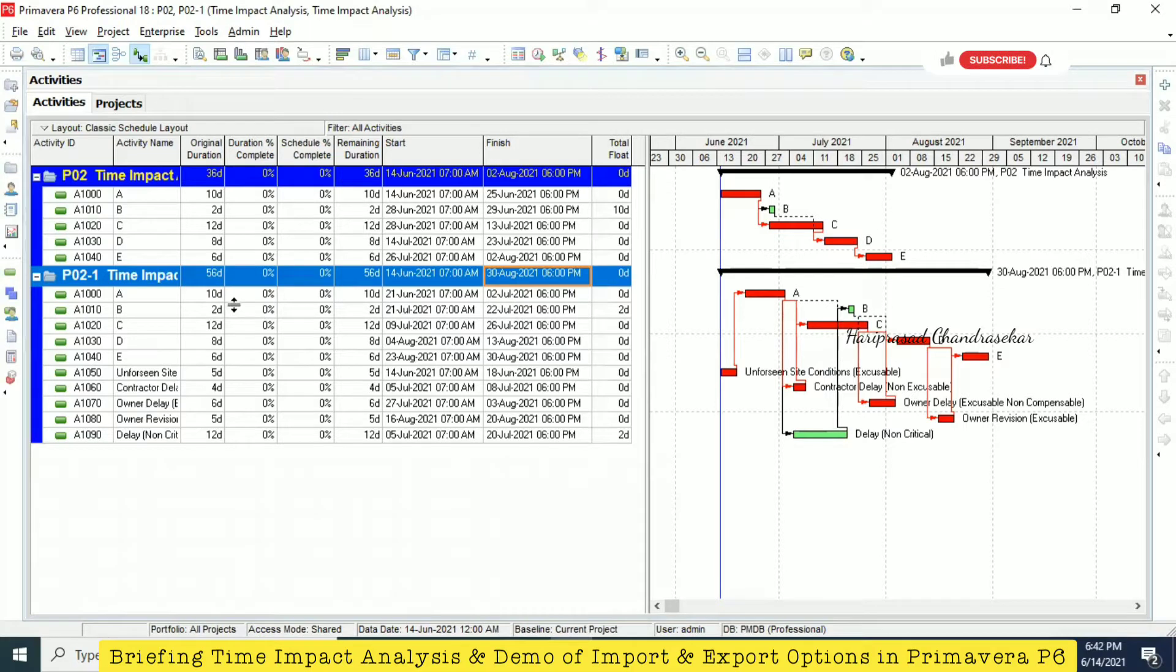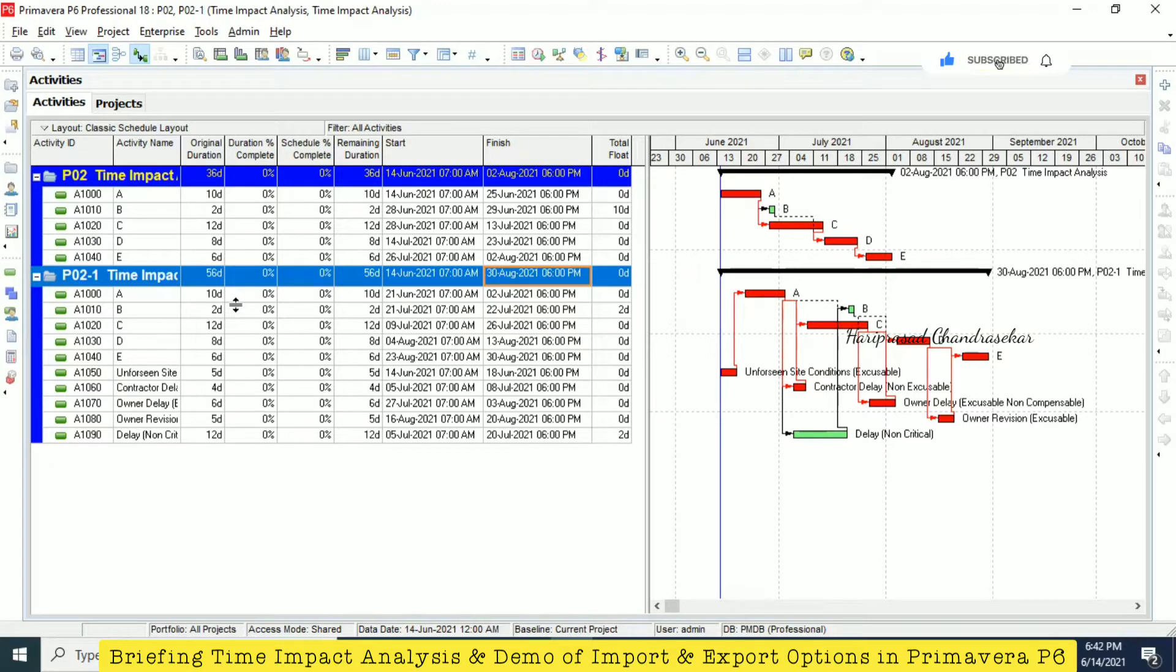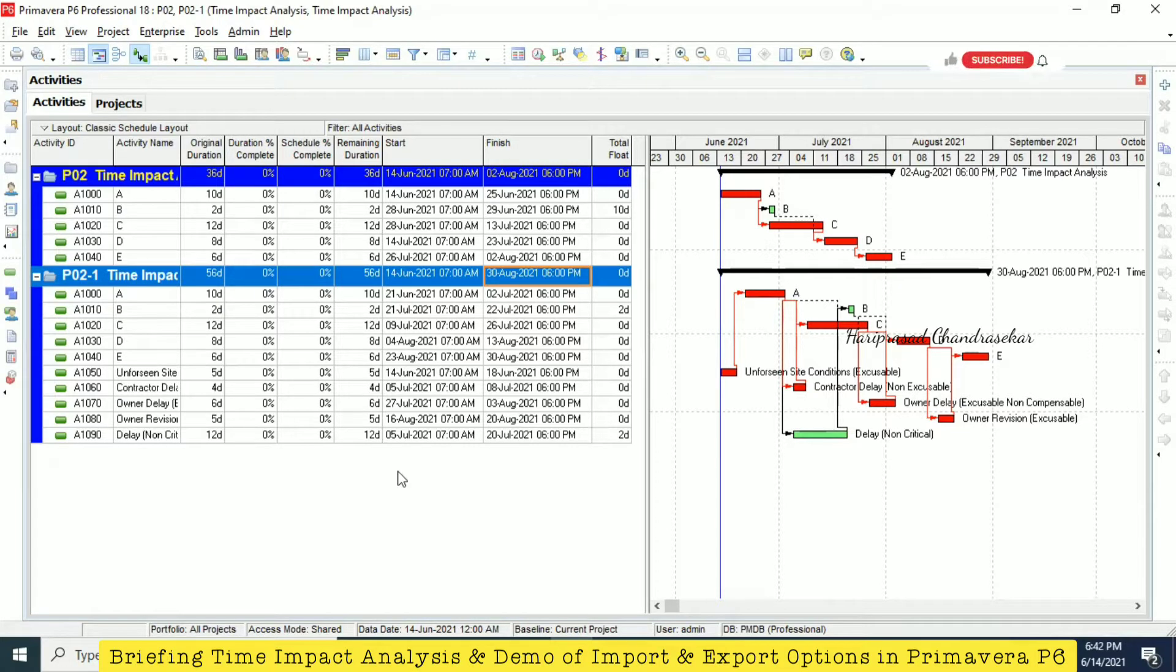In this 20 day, we can split it into excusable, non-excusable, or whether compensable or non-compensable. This is very simple. We can make a baseline by just copying the project and then analyzing, putting delays.